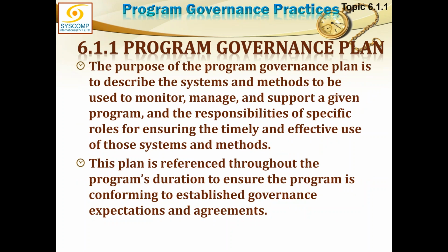The purpose of the program governance plan is to describe the systems and methods to be used to monitor, manage, and support a given program, and the responsibilities of specific roles for ensuring the timely and effective use of those systems and methods. This plan is referenced throughout the program duration to ensure the program is conforming to established governance expectations and agreements.